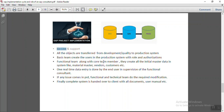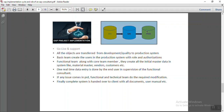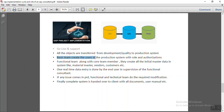In the go-live phase, all development is generally done in the development server and tested in the quality system. All objects — whether in development or quality — need to be transferred to the production system. Only once they are available in the production system will the client be able to use them. The basis team also creates users in the production system according to the roles and authorizations required by the client.